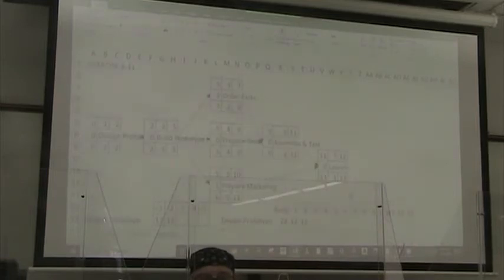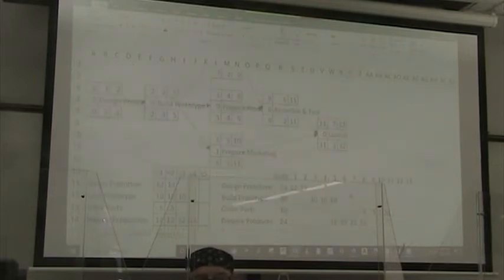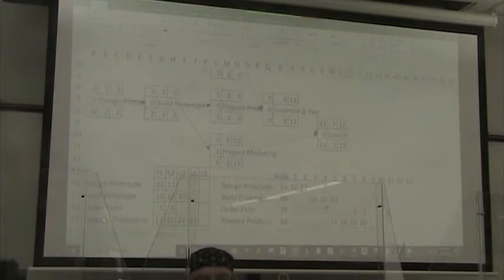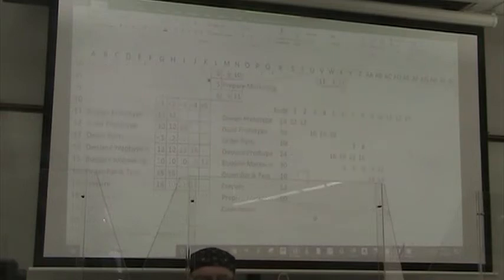Okay, so, all right, that also means that order parts has to start at 7, and prepare marketing has to start at 6. Six, right. All right, and assemble and test has to start at 9. All right, we're back on track. All right, and launch has to start at 11.